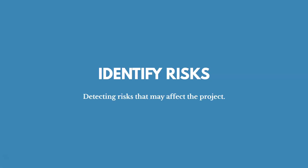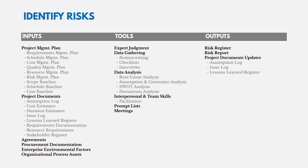Now let's talk about identifying risks — detecting risks that may affect the project. There are a lot of inputs on the left-hand side because there are lots of sources for identifying risks. You want to look at all of your plans to see if you've made any assumptions you may want to track and monitor, since an assumption could be a risk. There are also lots of tools for identifying risks, and the key output is the risk register.